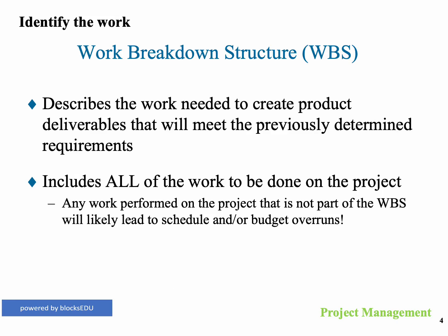The work breakdown structure is a key tool used by project managers to describe the work needed to create the project deliverables. It includes all the work to be done on the project. Let me repeat that. It includes all of the work to be done on the project. Any work done on the project that's not on the work breakdown structure will most likely lead to a schedule or a cost overrun. Work that's on the work breakdown structure is the basis for us to determine the amount of time it takes to do a task and the cost of doing that task.